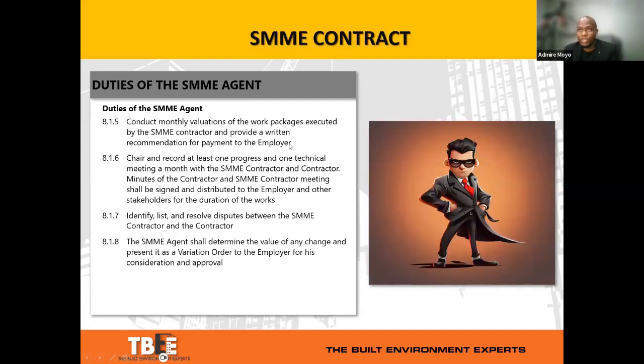All right. Then further duties of the SMME agent are to conduct monthly evaluations of the work packages executed by the SMME contractor, and to provide a written recommendation for payment to the employer, to chair and record at least one progress and one technical meeting a month with the SMME contractor and contractors.